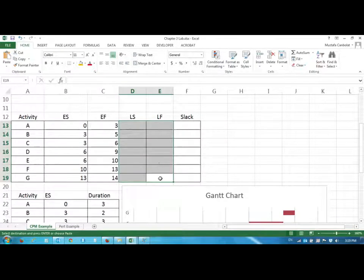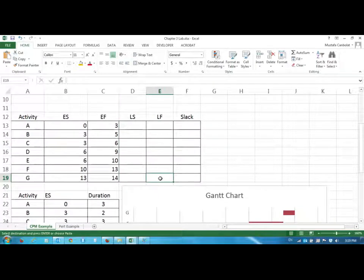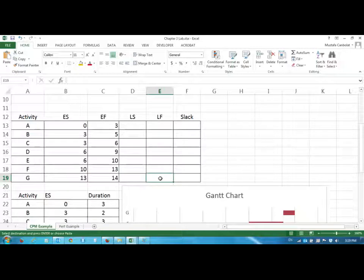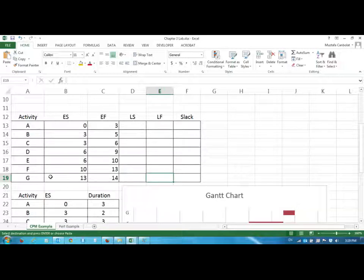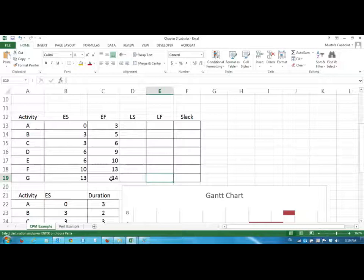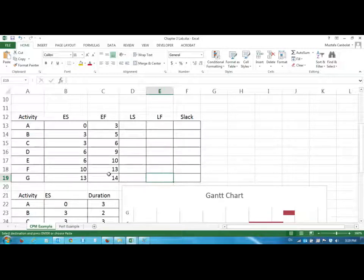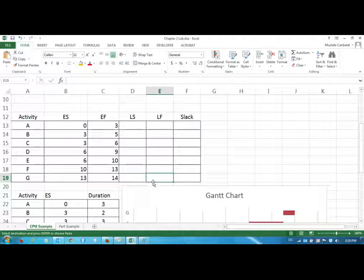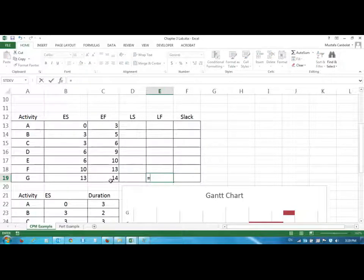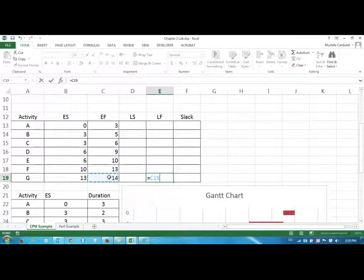So the late finish values that we are seeing here are the days or the time periods that we could finish the activities the latest. So if we want to finish this project in 14 days then the late finish and the early finish should not be different. So it has to be the same thing as the early finish value.